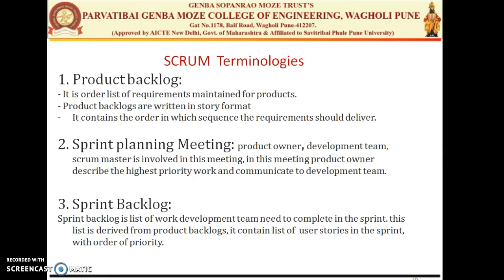This meeting is generally held at the beginning of your sprint. Generally they select what work should be done in this particular sprint. They prepare a sprint backlog from the product backlog, which will give the details of the time which will be taken for the particular requirements which we have selected. So they will discuss how much work should be done during the current sprint cycle.